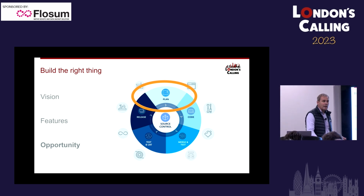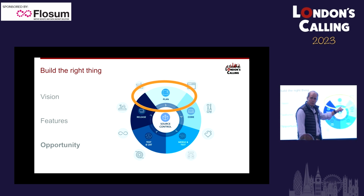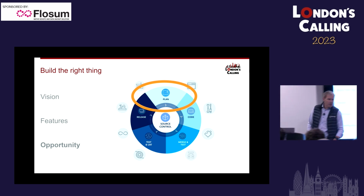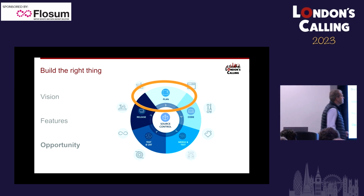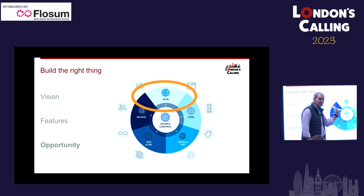in enough projects where, in 1988, I actually was responsible for throwing away £7 million worth of software, because as we got into this bit here, we realised we hadn't done that bit right. That was a pretty painful experience actually for the business, when you realise quite a bit more work here wouldn't have resulted in a 3-year delay and throwing away £7 million worth of software. So understanding how to build good user stories, which is the output from really understanding what the business needs,